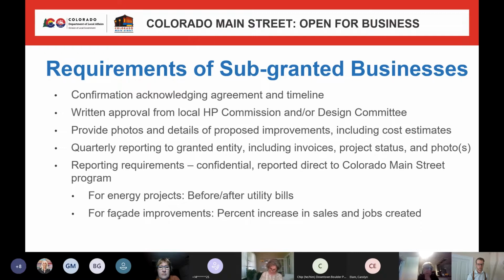And then I've added in a contingency, which I'm saying throw in a 10% contingency on that based on the fluctuations that are happening in the marketplace, not only because of supply chains, but also on some of these older buildings, when you get in to replace a window, you find that you have to also fix the frame and add some insulation. So instead of going through a variety of change orders, I'm just suggesting that people put a 10% contingency in there for the what ifs.